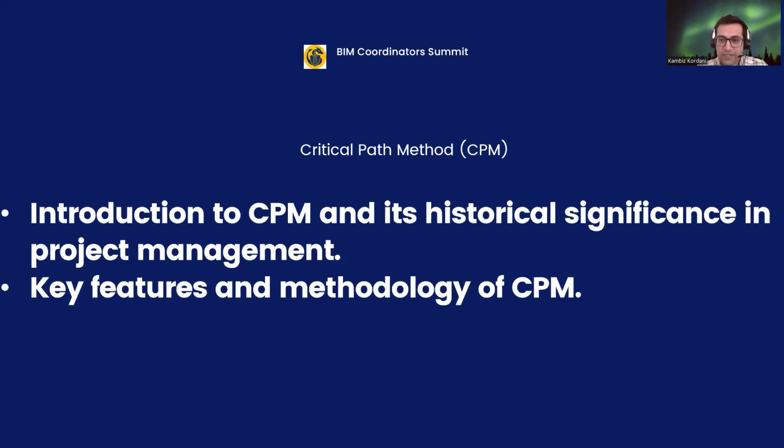The critical path method offers a time-tested approach to project management. It focuses on task sequencing and schedule optimizing to ensure project completion within the stipulated time frame. And time frame plays a crucial role in the critical path method. The critical path method is a cornerstone of modern project management. It originated in the 1950s and has revolutionized the way projects are planned and executed by identifying the longest sequence of dependent tasks, and it calculates the shortest possible project duration.